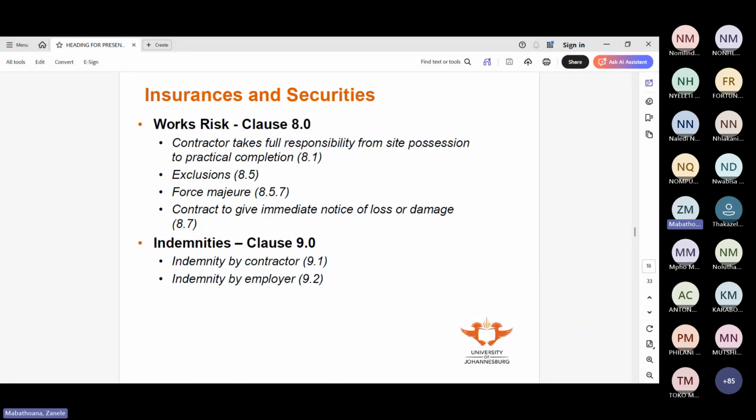So like I say, JBCC would be a terrible contract. However, whatever the contract is or the measurement tool that you use, it should make provision for those contingencies. And this is why, when you look at that system, you have excavations in trenches, but they deal with bulk excavations, like where you're creating your basement, slightly differently. Not sure if that brings you closer to the answer or not.